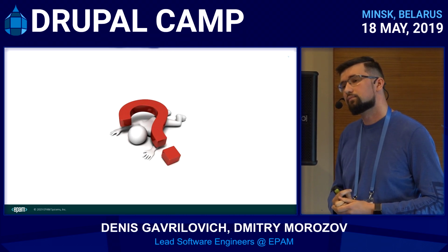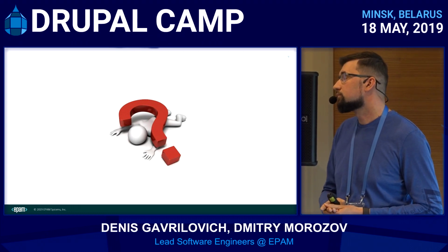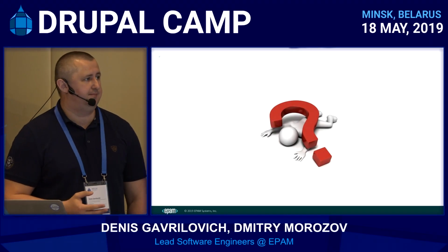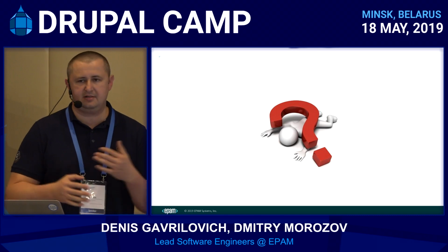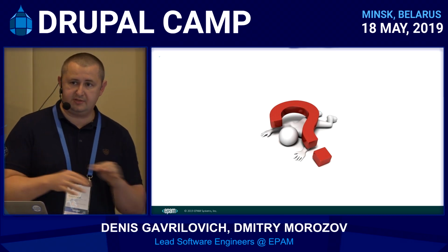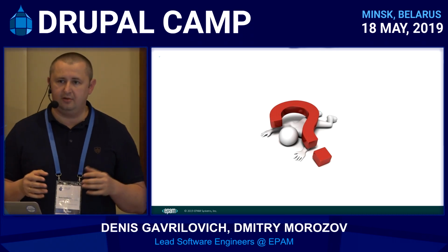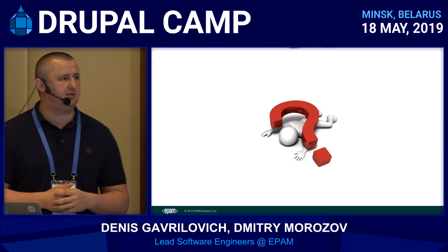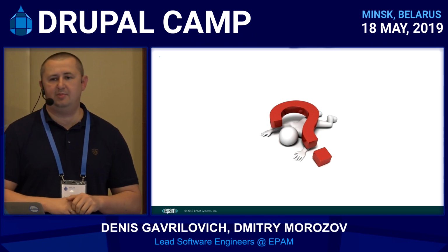I got the impression it's something like a variation of Scrum. Am I right? We use Scrum of Scrums. Yes, but if you're talking about development methodologies, on previous slides I explained the structure of our teams. Of course, we have Scrum for our main team, the platform team, because it's a product team. It develops functionality and it's better to use sprints and so on. The same goes for the CI/CD team, because it's a tool. But in the release team, we use Kanban, because it includes some fixing and it's a different process. That's why we have different ones: Kanban, Scrum, Scrumban, and so on.